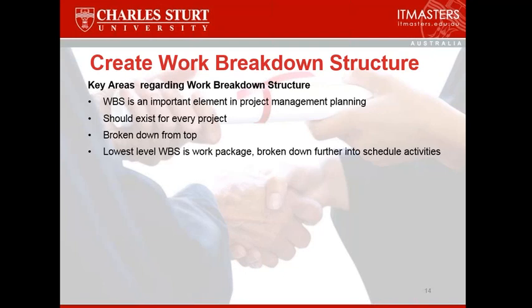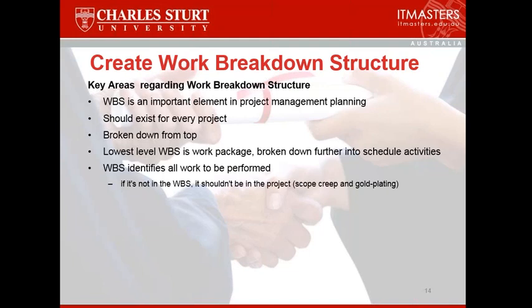When somebody says, can you give me a work breakdown structure, there is a school of thought. Well, essentially the school of thought comes from Microsoft Project. Microsoft Project calls the schedule, the list of activities, a work breakdown structure. PMBOK does not, and the ISO, the International Standard for Project Management, does not recognize a work breakdown structure as a list of activities. That's a very important thing to know. So when somebody asks you for a work breakdown structure, do make sure that you understand whether they want a PMBOK version of the work breakdown structure or a non-standard Microsoft Project list of activities.